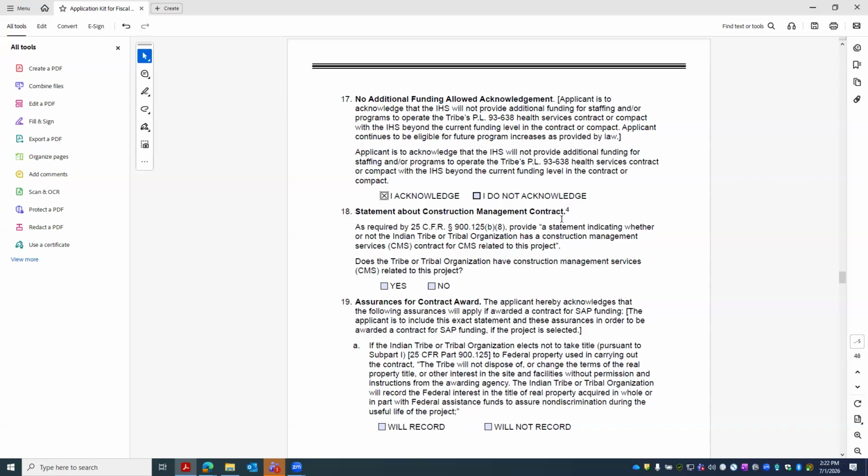As soon as you start doing foundation work, your project will automatically be ineligible. You can do clearing and grubbing, clearing the site of brush and trees or anything else to make it ready for construction. But as soon as you start digging for that foundation, that is when your project will automatically be ineligible.